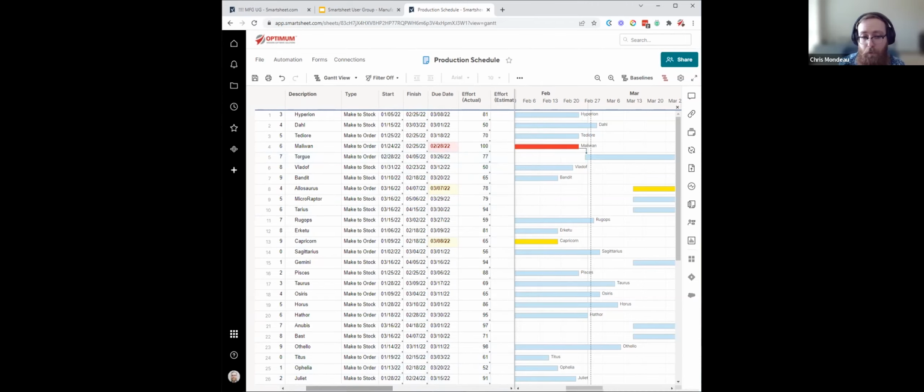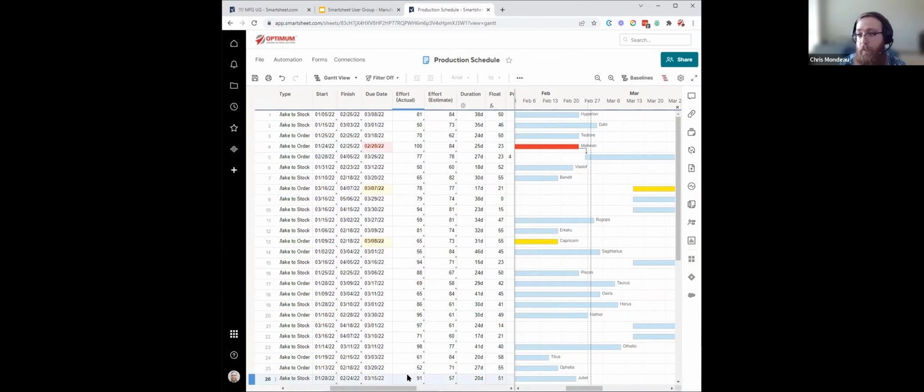There's actually a brand new formula that Smartsheet released that I think is very valuable in the manufacturing space, and that's the float function. And in this case, it's just a total float based on your primary column, but that will tell you how many days you can shift it without impacting the schedule. So if you haven't seen that yet, it might be something interesting to check out and try implementing within your builds. So that's how the predecessors of the relation manager within a batch environment work.